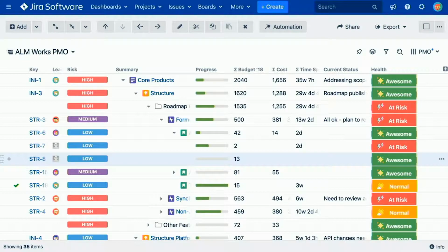And then for the hierarchy, you can show all kinds of valuable metrics, which you can calculate right inside the structure. So we have some functionality for calculating progress based on the hierarchy, any numeric total. So for example, if you're not logging any time on the initiative, you can quickly roll up all the hours to the initiative level, as in this case. Plus we have some features for more sophisticated calculations, doing some complex metrics, using formulas similar to Excel formulas.